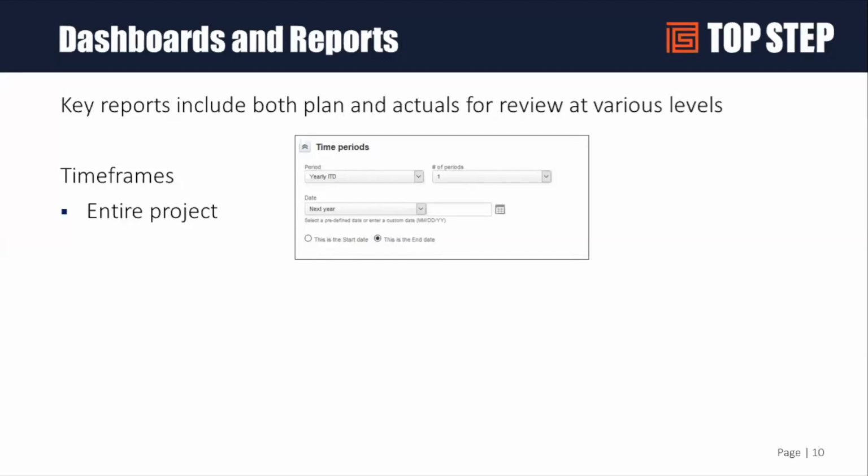I'm getting all the assigned hours of the planned. And then the booked with actuals is showing me where am I going to end up based on my burn so far, because it's pulling in all the timesheets, then it's adding my future bookings, and that's going to give me my ending number, and I can use that ending number to compare to my plan to see if I'm planning to go over budget.